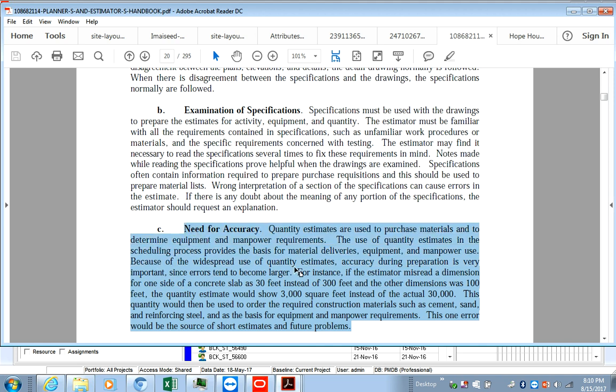You will be involved because if any issues are uncovered or any risks materialize during the design phase, it would have an adverse effect obviously later on in the project. So if the issues are not found now, i.e. the prevention technique, you will still obviously come to realize that risk later on through the program, okay? And then you have to go back to the drawing board, and going back to the drawing board would entail you having to call back designers, etc., draw up new specifications, and pay a lot more money, right?